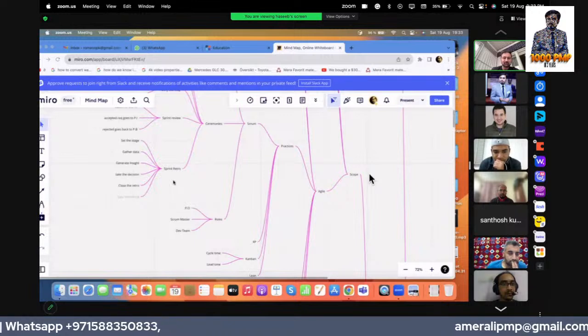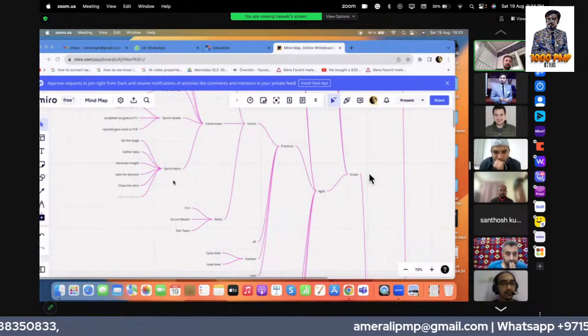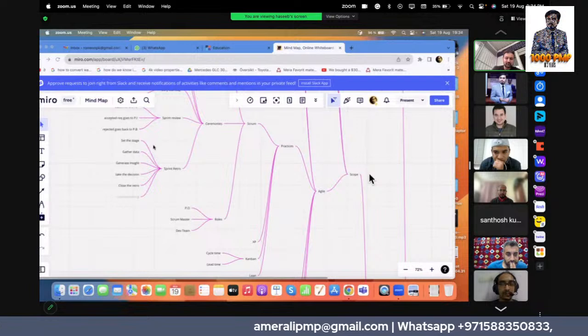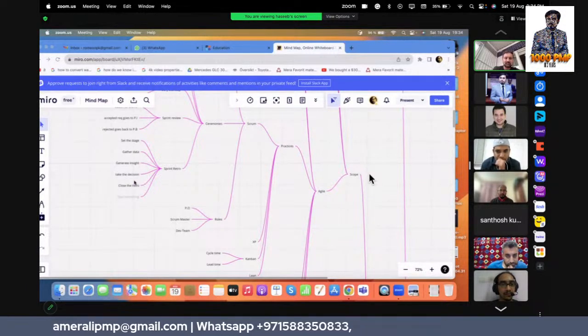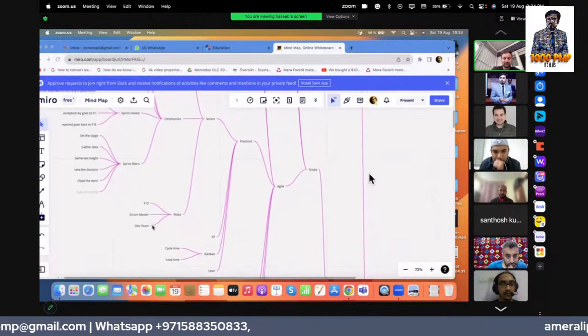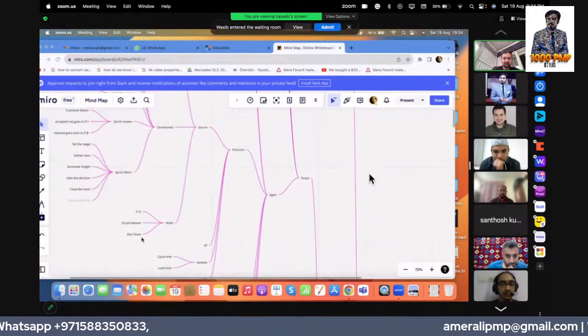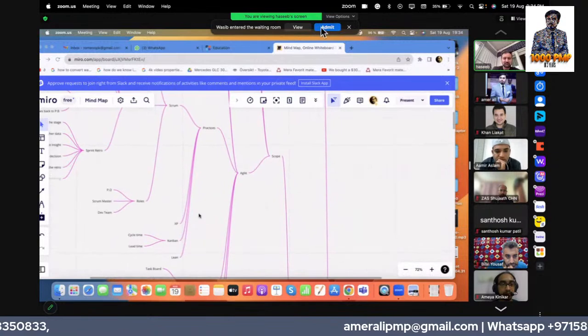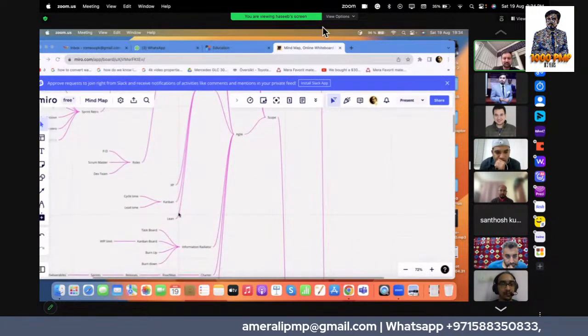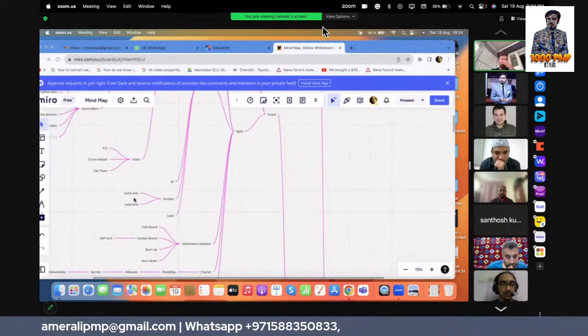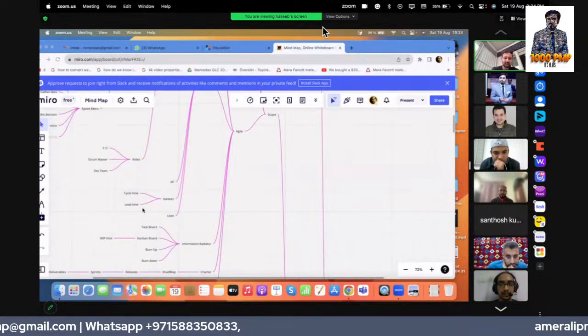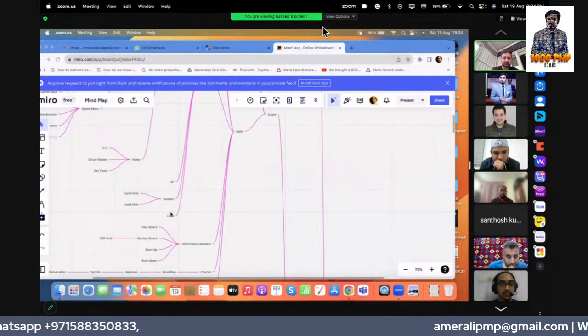Sprint retro is a stage to check what could be improved, what we could make better. Then we set the stage, gather the data, generate insights, make the decision, and close the retro. There are three roles: product owner, Scrum Master, and the dev team in the agile team. Besides Scrum, the practices we have are XP, Kanban, and Lean. In Kanban, we have the cycle time and the lead time. Cycle time is where a requirement goes from to-do till the end. Lead time is from when it is requested until it goes to the end.